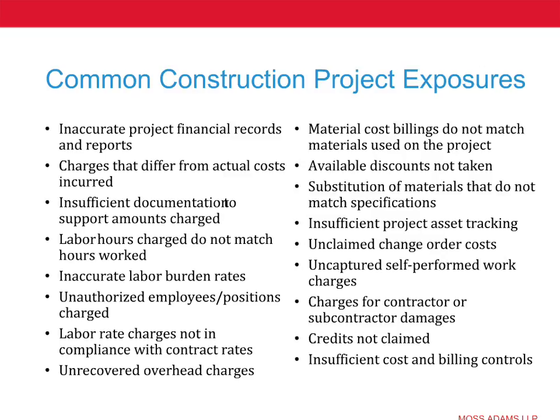Well, I would strongly encourage you to negotiate rates on the basis of facts and supportable information, and not only for the rates, but for the expected hours incurred. I mean, there's a lot of takeoff information you can use. You can use RSMeans, you can use other tools to gain that information. But some of the best information you'll have for forecasting your hours is, what did it cost to do the job the last time? Similar work, what were our metrics when we've done this work before, and tracking those metrics. It's amazing how many contractors do not track this information and use it when they're bidding the work. And the more regimented and tied down you are, the better off you are.